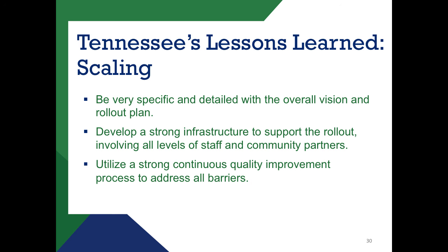We now have a report that goes out monthly, and our regions have a baseline, a target, and an actual of where their custody numbers currently are. So they have a baseline that they started on July 1 of 2014, and then every month they put in their actuals, and they actually have a target goal that they sat down with the commissioner and the assistant director of fiscal and established their target goal of how much they were going to reduce admissions and how they were going to reduce care days and length of stay. And so that's been very exciting for them to really start to think about data and how that has an impact on your 4E waiver, especially with the finance mechanisms with that.